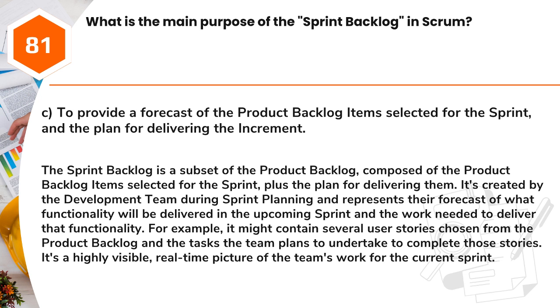Answer: C. To provide a forecast of the product backlog items selected for the sprint, and the plan for delivering the increment. The sprint backlog is a subset of the product backlog, composed of the product backlog items selected for the sprint, plus the plan for delivering them.